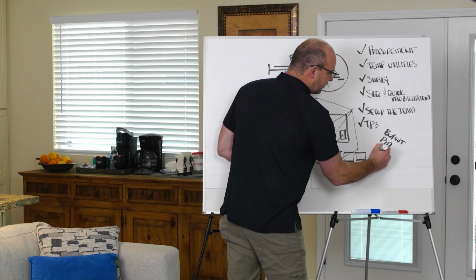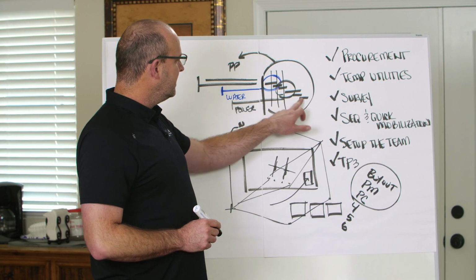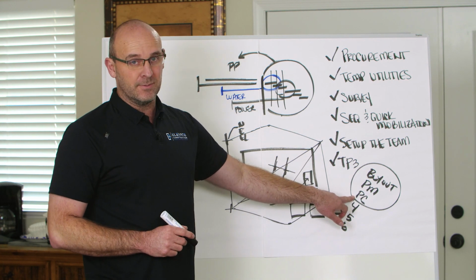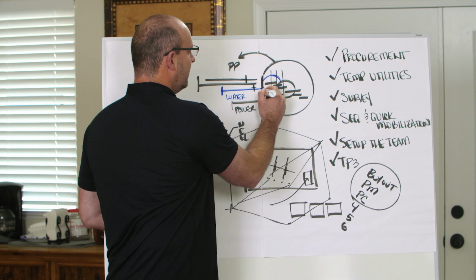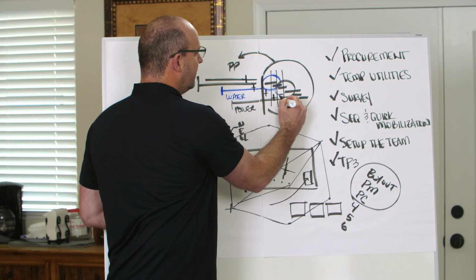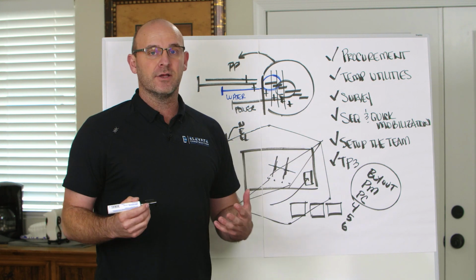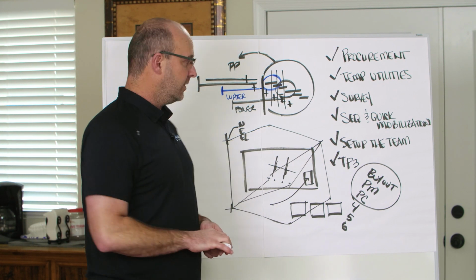I don't need to go through those right now, but these are critical. I want to see that all of these activities have the right buyout, pre-mobilization, and then the preparatory pre-construction meeting happening at the right times ahead of the activities by 3 weeks, so that they are ready to hit the ground running, and they're not going to be on treasure hunts. They're not going to be confused. They're not going to wonder what's going on.